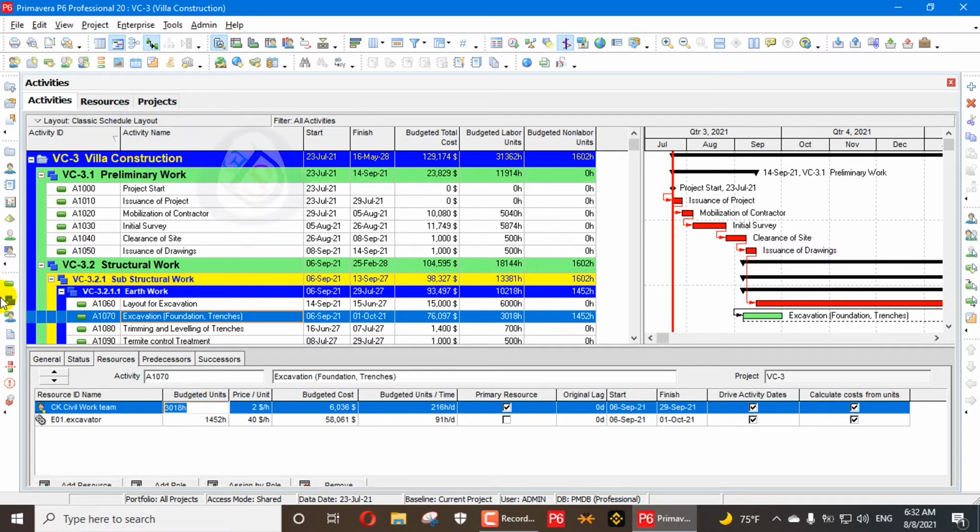For example, here is 3018 units and the price per unit is $2 and the cost total calculated is $6036. So it's obviously when we add here 4000, you can see it's 8000 here. It's obvious that the units calculating is done. And if we change from here, for example, I say that in budgeted cost I have $9000, you can see it's 4,500 hours calculated reversely from cost.